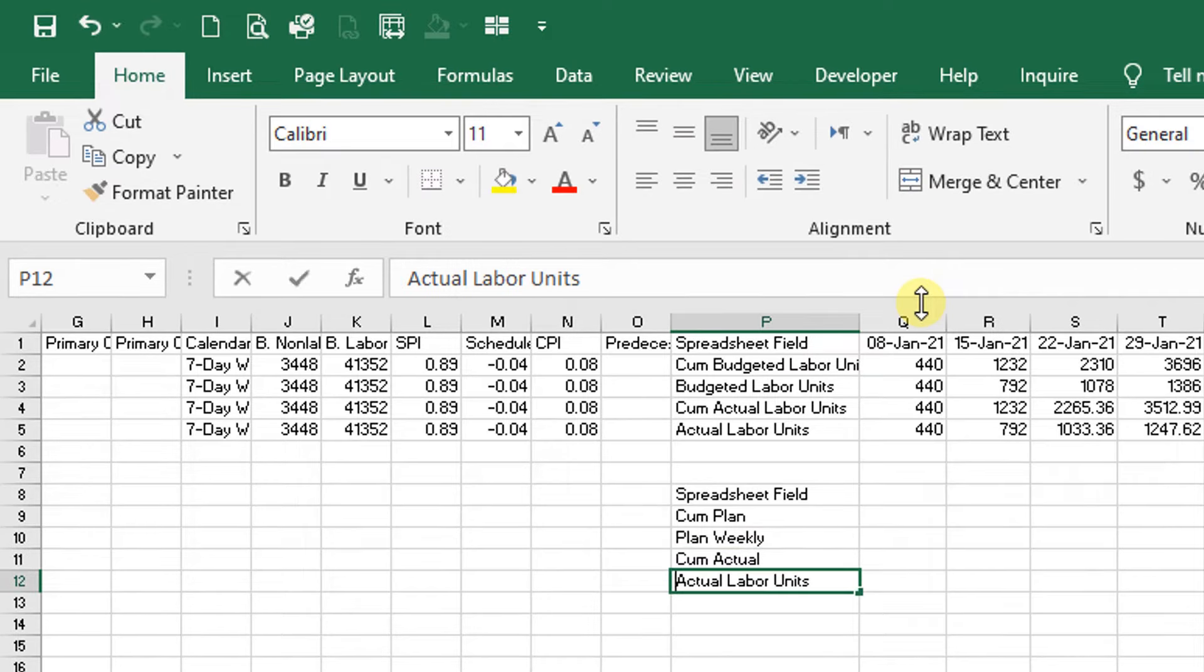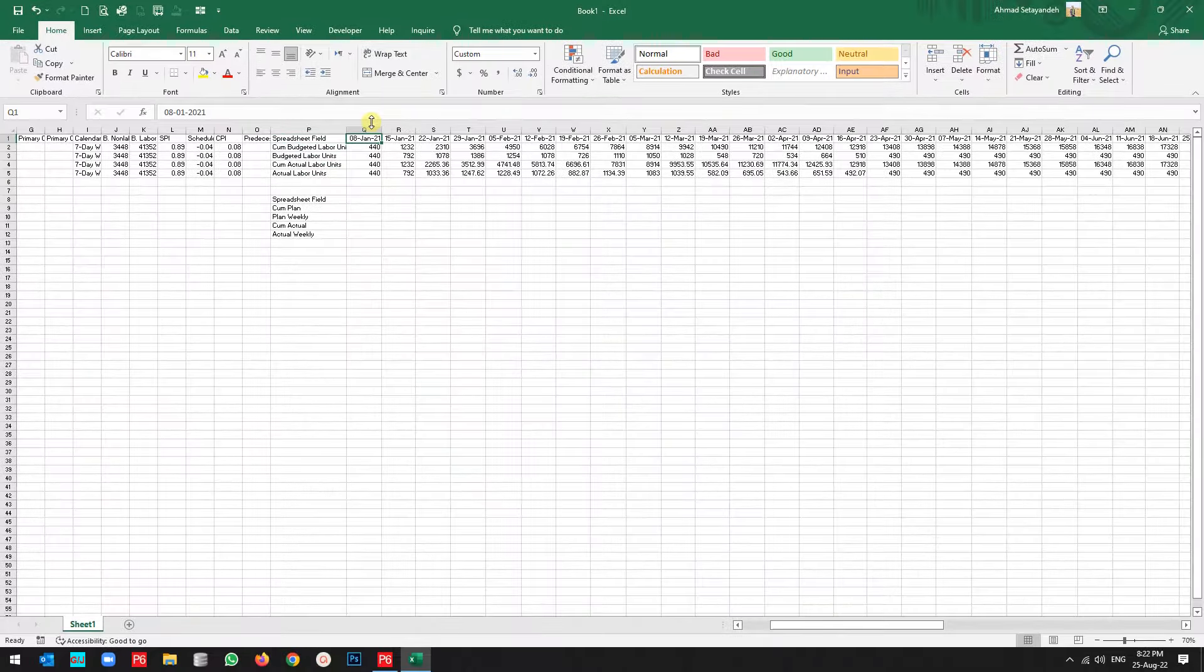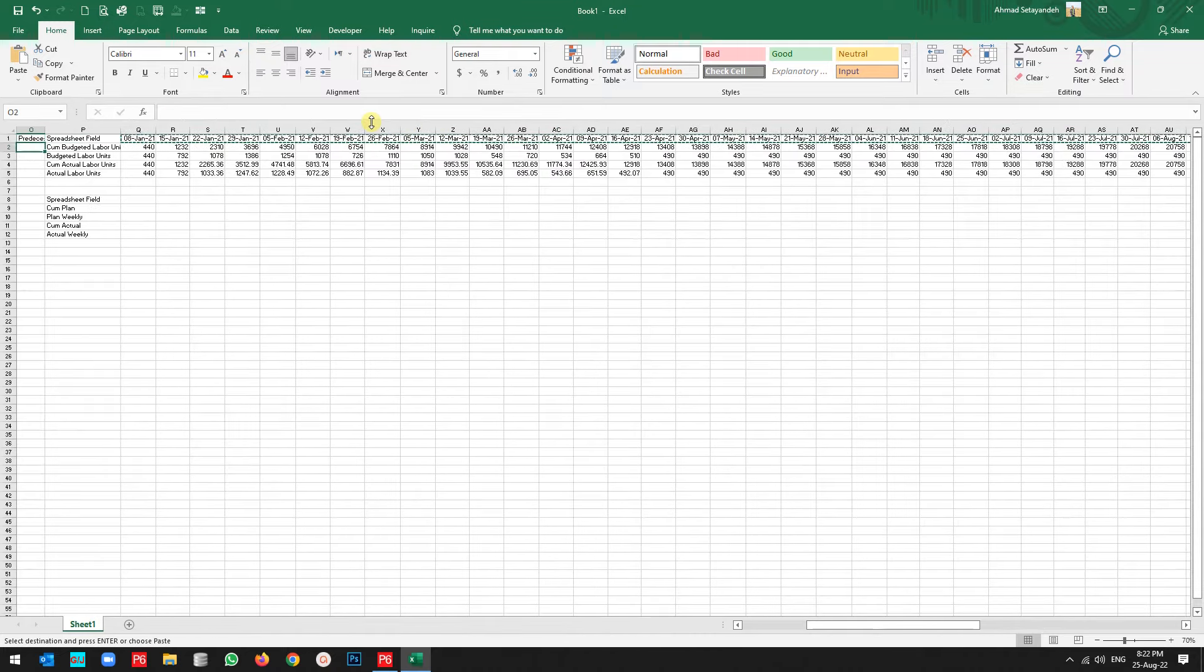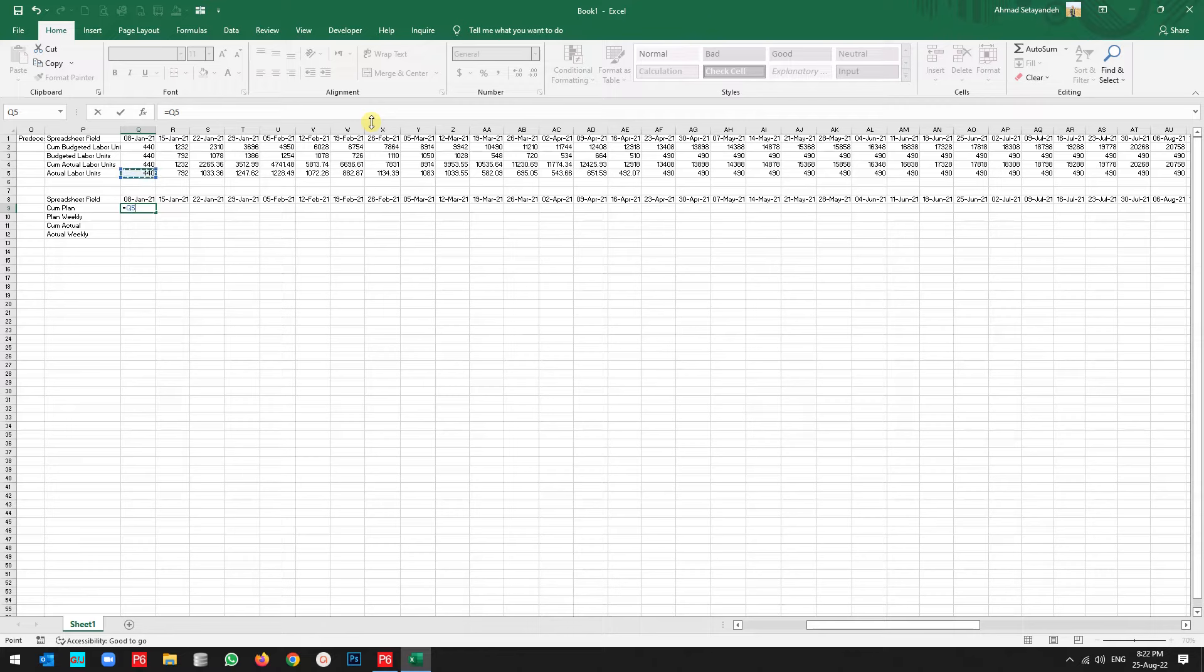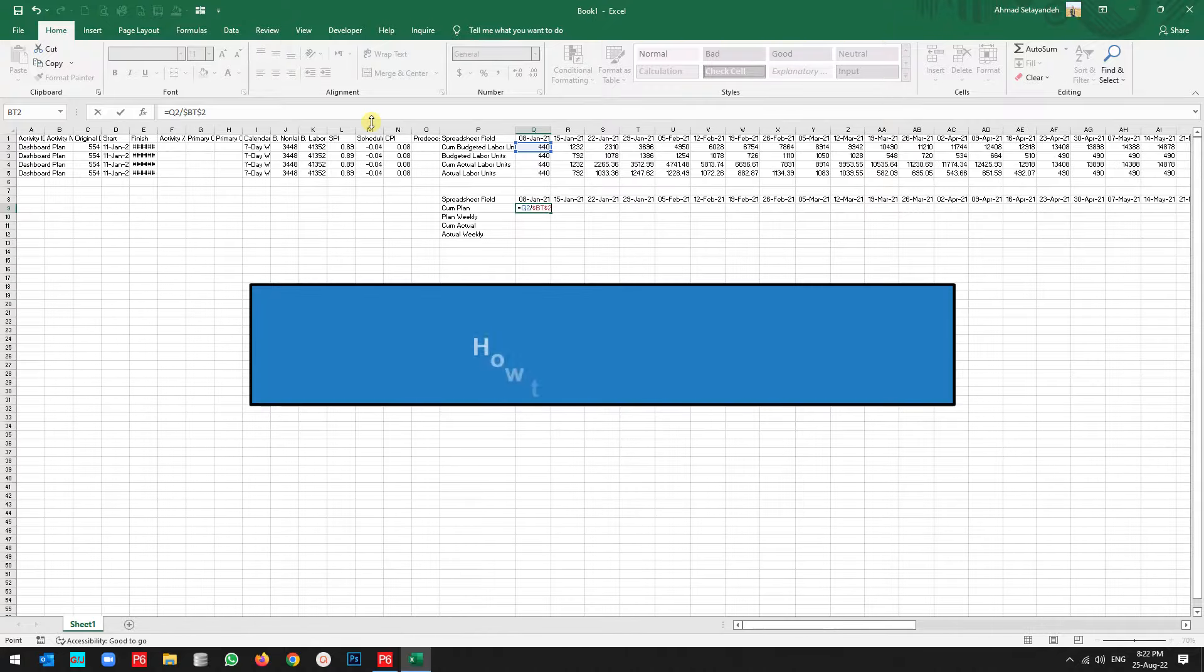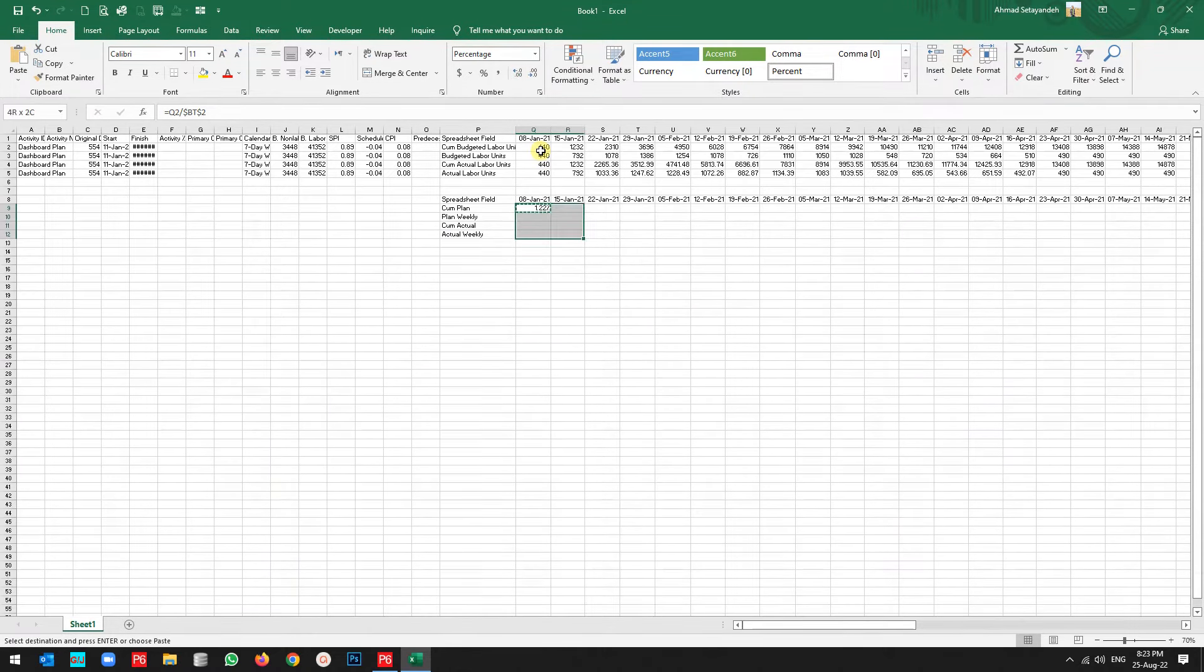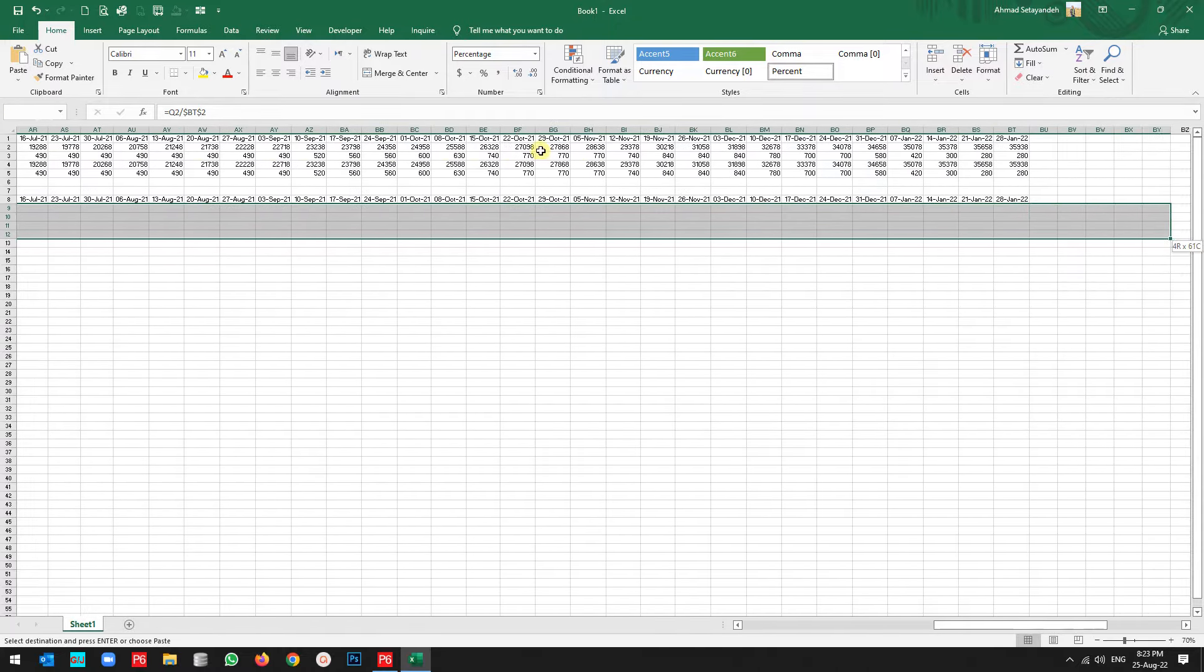Then now I want to take the time scale, so copy, paste it. Now the formula for this is the man hours from here, from the labors, divided by total man hours and freeze it. Now change it to percentage with two decimal. Copy, continue this formula to the end of Excel.